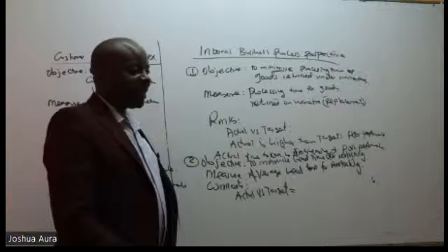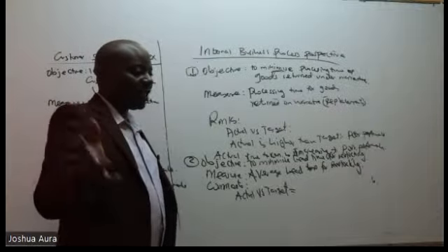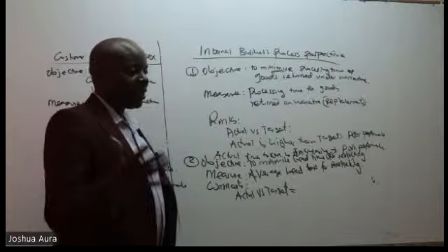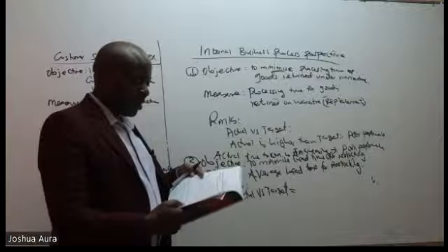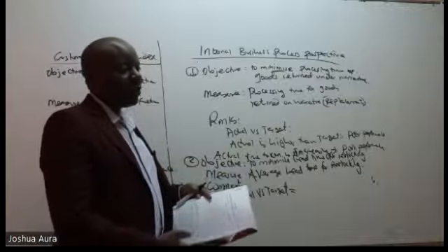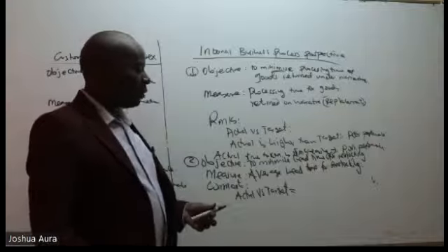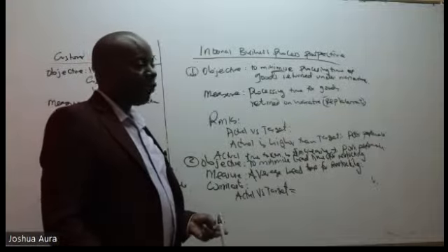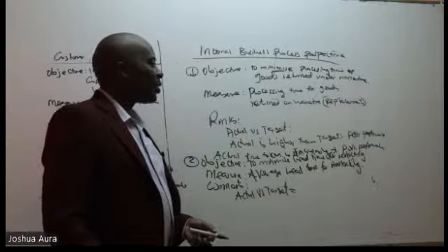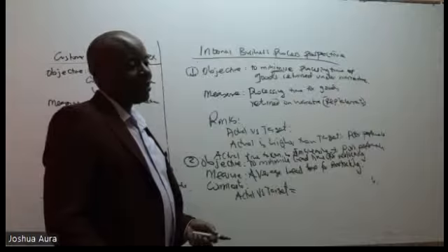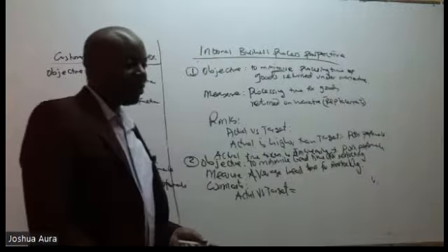In terms of the trend, you can see that the actuals are doing what here? The actual is increasing from 3 to 4.1 days. Again, a signal of what here? Poor performance, because as Jamie told us, that signals more delay. That signals more delay. Right.